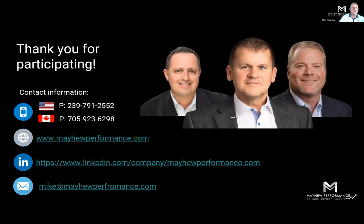Then when you get into execution, that should never happen. There shouldn't be a machine that arrives on site and we don't have enough power. If that does happen in today's world, it's shame on the OEM and shame on the client, to be quite honest with you, or even the engineering firm did not do their homework properly. I know it sounds harsh, but I'm a straight shooter. We need to understand what the impacts are. Diesel is a completely different beast because now we have to distribute fuel down the shaft, or we put in a slick line or a bore line and we push fuel down.